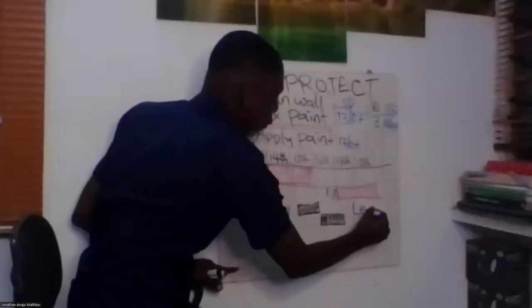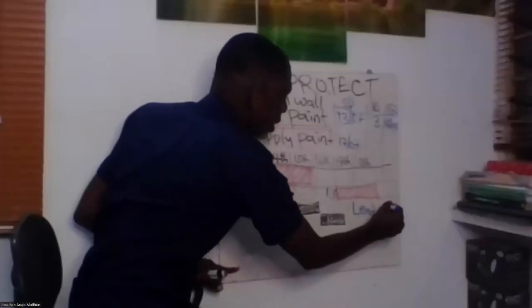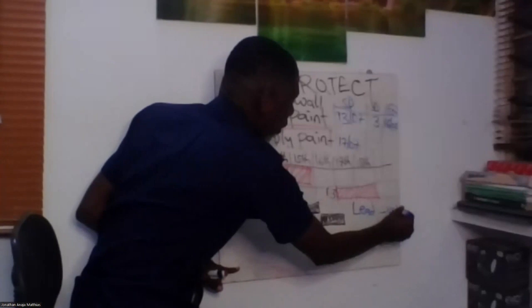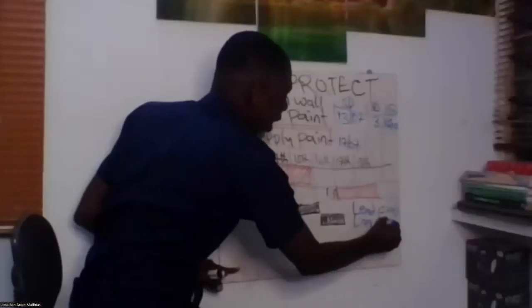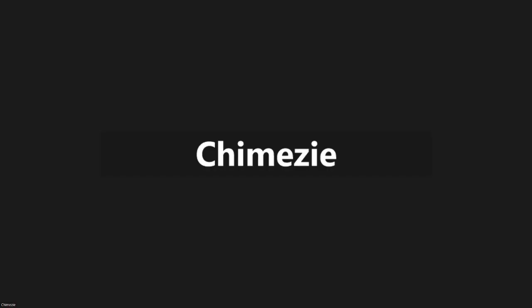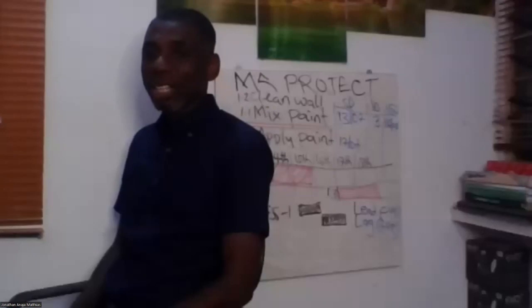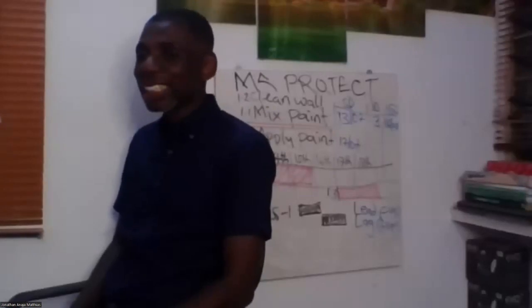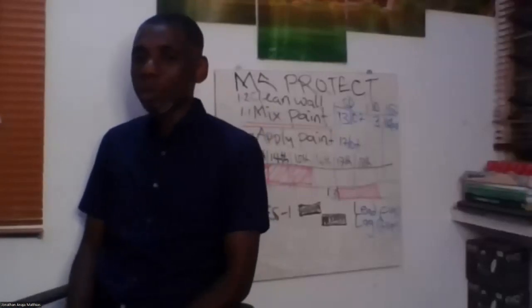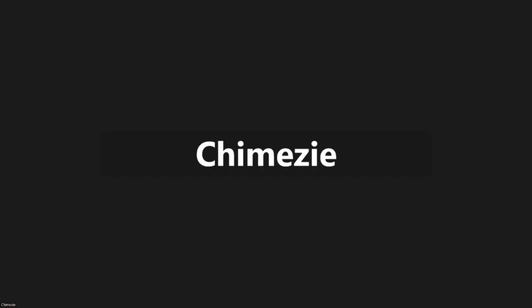Just put this at the back of your mind, please. Lead carries a negative sign. Lag carries a positive sign. You can take note of that. Lead carries a negative sign when you are putting it on your MS Project. Lag carries a positive sign.